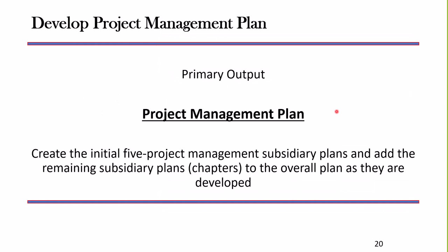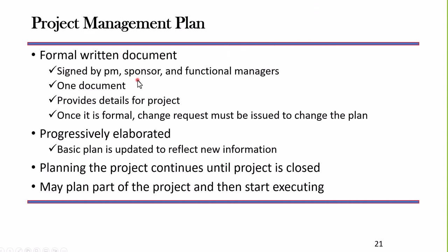So we have our stakeholders' requirements. We need to have a project management plan. When we talk about a project management plan, in traditional project management, we're talking about up to 19 subsidiary components to that project management plan. We have one project management plan, but that one project management plan is going to be made up of perhaps 18, 19 different subsidiary components. So we look at that in a little bit deeper depth.